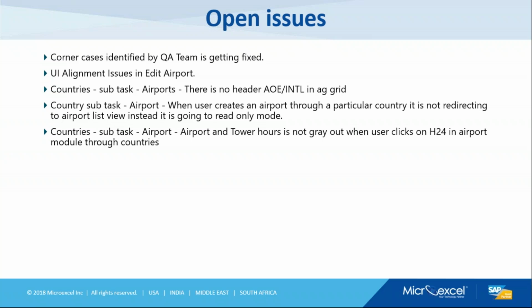These are the couple of issues which are already identified, and as I told, there are around 70 defects. We have a buffer day tomorrow and a weekend, so before the next sprint starts, we are targeting to clear out the major chunk. But if there are defects, we are going to take them up in the next sprint and fix that. So, this is the overall view on Sprint 12.